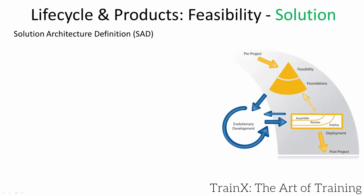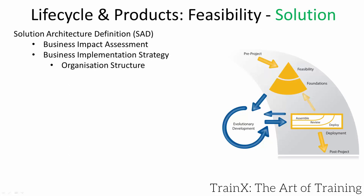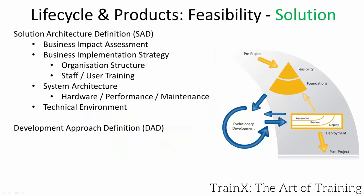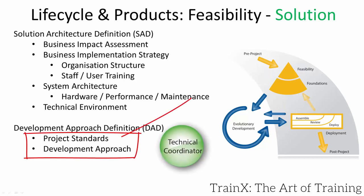The solution architecture definition captures a wide range of business and technical information — for example, how the new system will affect the business. People will need training, job roles may alter, new staff may be required, and new hardware such as servers may be needed and will require maintenance. For IT projects there will also be technical development environments requiring documentation. The development approach definition describes project standards for analysis, testing, and configuration management. The technical coordinator produces this document, and the project manager ensures development is in accordance.